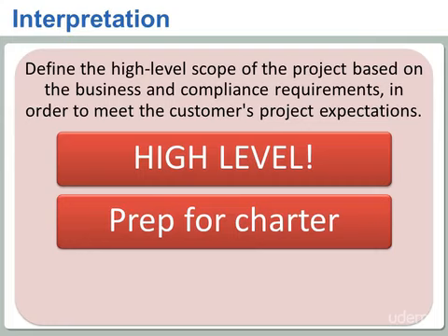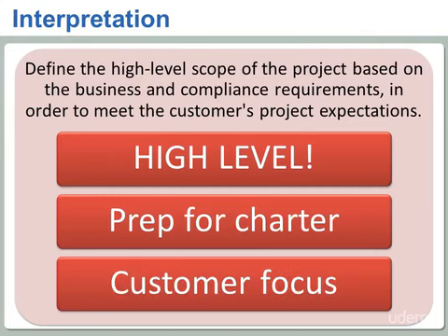The scope could be to build an airplane, to build a train, or to rent enough buses to transport them. Each of these solutions would satisfy the high-level requirements that we have. All of this thinking automatically leads to a clear focus on the customer. The customer requirements are important. What we want is secondary.